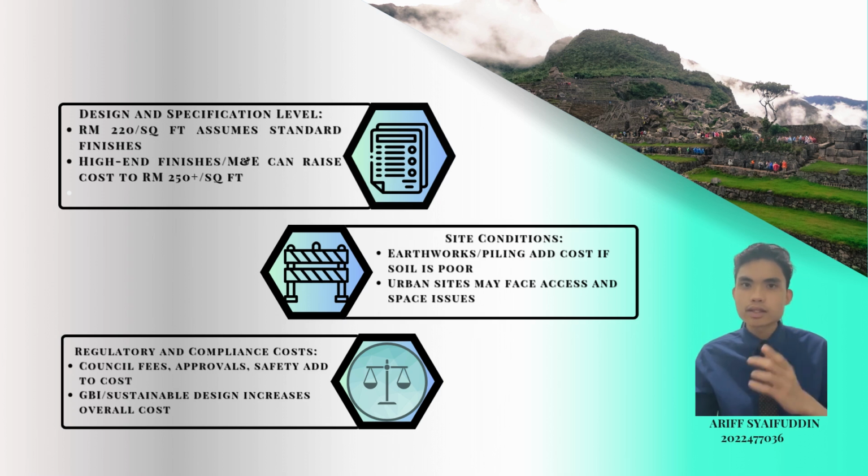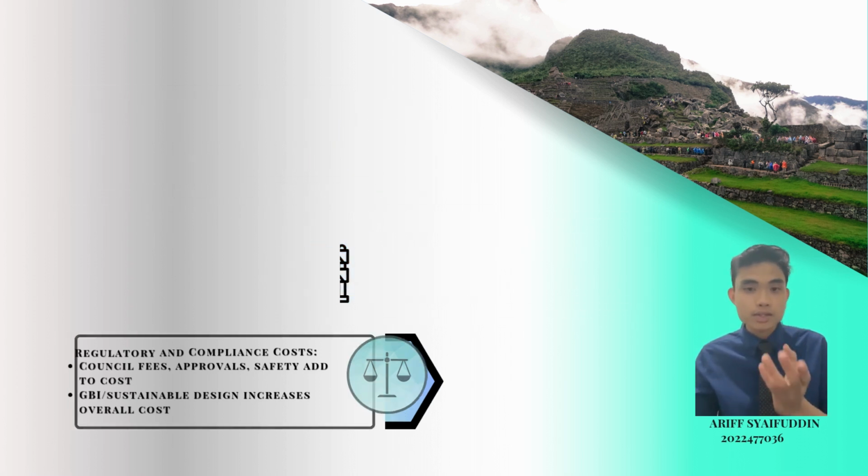And lastly is regulatory and compliance costs. Local council fees, approval charges, and fire safety or education related requirements may add to costs. Compliance with Green Building Index, GBI, or Sustainable Design Standards will also impact costs.